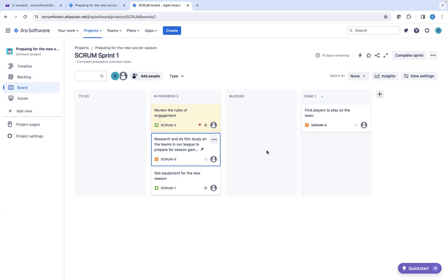So that's in progress, but it's blocked there in progress. If you moved it to block, you wouldn't know where it was, if it was in to do, in progress, or what have you. So that has helped my teams, especially being cross-time-zone. We don't always meet face to face or on the calls because of the time differences, but by having good notes under these cards, we can still keep people aware of what's going on here. That's all I had.